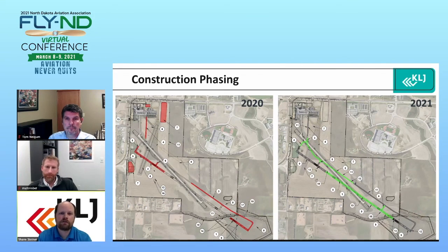Another risk of doing it in 1 year is that the contractor would have to build risk into their cost for that project, just in case it didn't get completed, whether it be weather or something else comes up. So we anticipated a little bit higher costs. And in talking to a few of the larger contractors that would be interested, they noted as such that would be risk that they would have to build into the project.